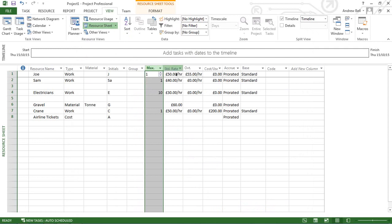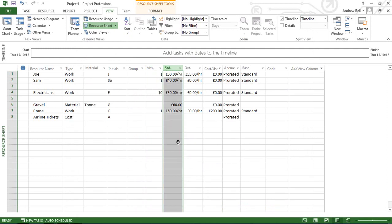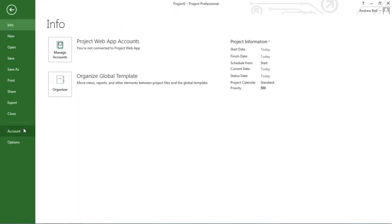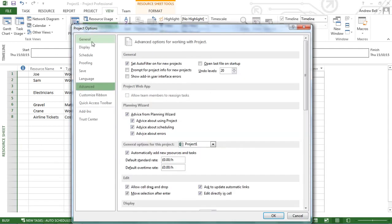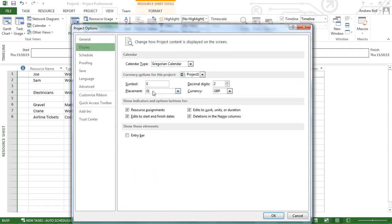Another common question is: I want to work in Euros or Dollars — how can I change away from pounds? That is in File > Options > Display. You can change the currency symbol to something else.